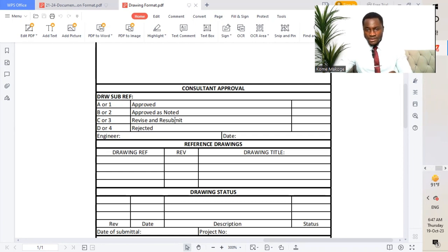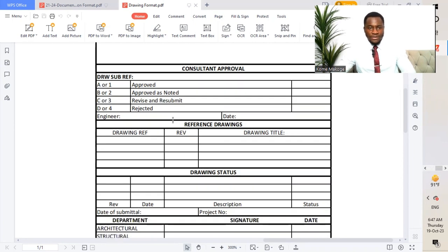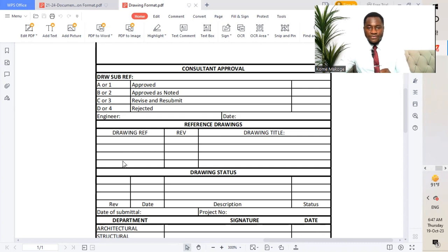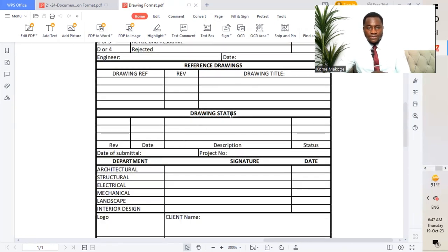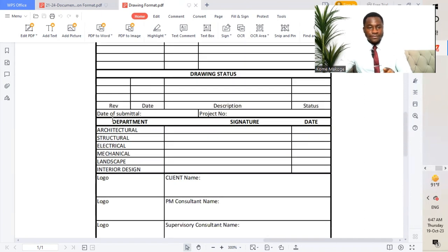Code D means rejected — out of scope. We have the engineer's name and date, so once the appraisal has been done by the engineer-consultant, they put their signature and date. Reference drawings: we mention the reference drawing number, revision, and title of the drawing. We have the drawing status, the data submitter, and the drawing project number, which varies with the different project.